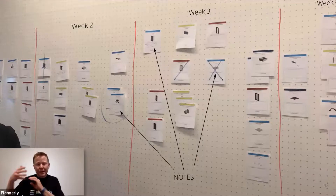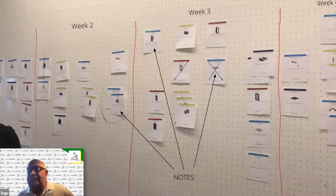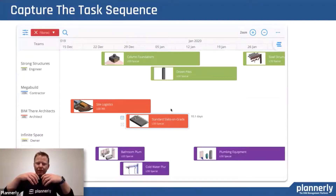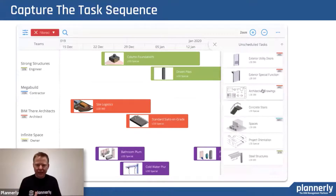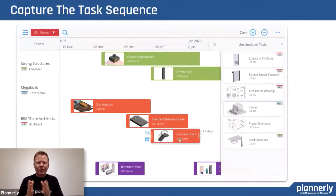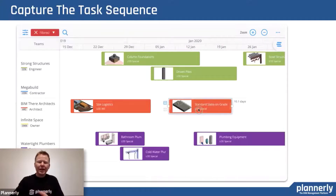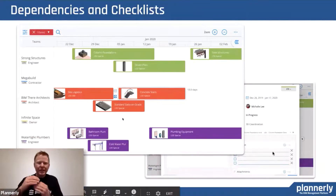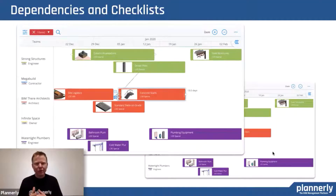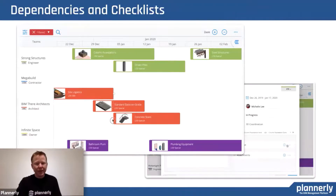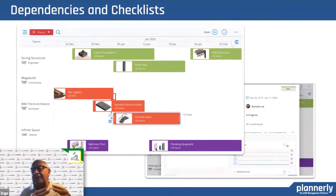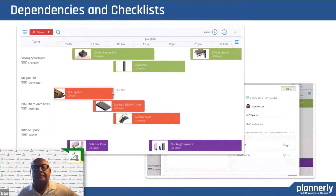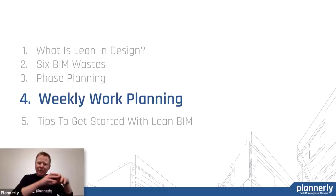A lot of the time the plan is left on the wall — and in design that's not easy because everyone's gone back to their own offices. So there needs to be a way of capturing this digitally so that everyone has access to it. Those cards can be represented as the period of time they've committed to, with the dependencies they've asked for and a checklist. It's really important to define that in electronic form with dependencies. The nice thing is it integrates what was scoped in Plannerly with the actual tasks, making sure we've got them all accounted for.